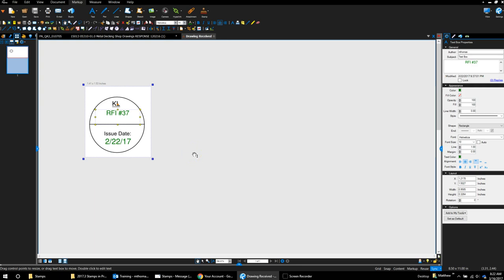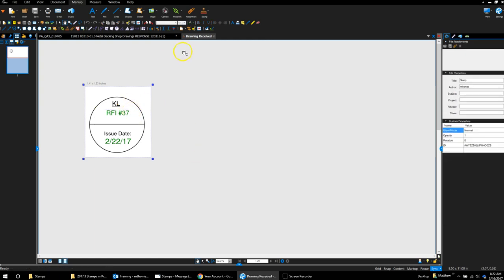And the reason I do this, and I think it's important to do, is sometimes they'll give you a new revision and it might be the same as the old revision except something's changed. Sometimes they're not very diligent in how they do their plan revision. So I always like to do that just so I can always tell what that plan set is and make sure that I'm using the most current one. So once you've made those changes, same thing, you can just hit save.